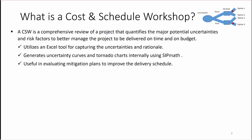What is the Cost and Schedule workshop? It's a comprehensive review of a project that quantifies major potential uncertainties and risk factors to better manage the project, to deliver it on time and on budget. It utilizes an Excel tool for capturing these uncertainties and the rationale, and generates uncertainty curves and tornado charts internally using something called SIPMath, which I'll describe later.